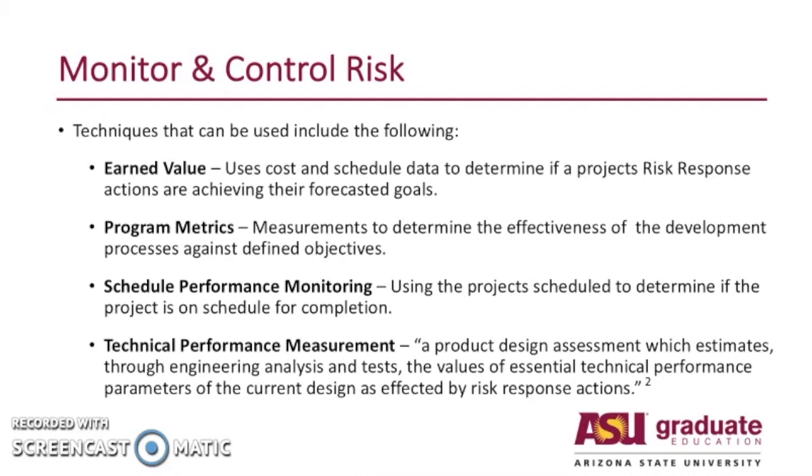Next, you want to look at schedule performance monitoring, using the project schedule to determine whether or not the project is actually going to finish on time. And then last but not least, you want to look at the technical performance measurements. This is a product design assessment, which looks at the estimates through engineering analysis and testing to evaluate the value of the technical performance parameters within the project and the risk response actions that are taken on some of those technical items that are involved in the project.